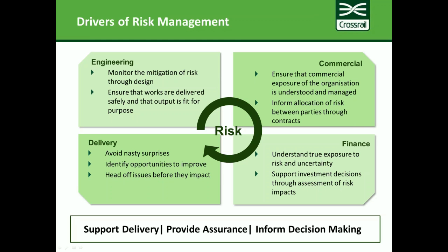Moving across to the top right, the commercial team are also very interested in the risk management process to ensure that the commercial exposure of the organisation is understood, and that the allocation of risk between the stakeholders first and foremost, and then across the supply chain, is first of all well understood and then appropriate and efficient.